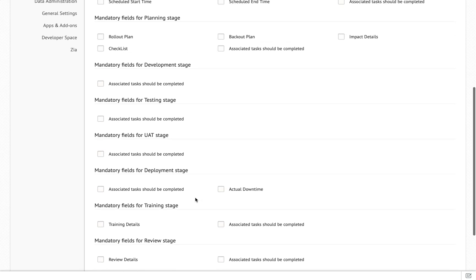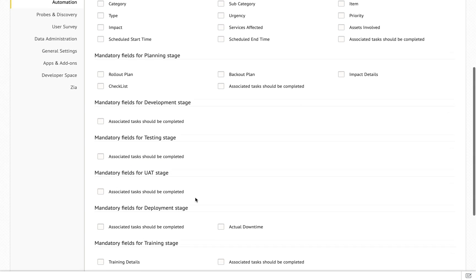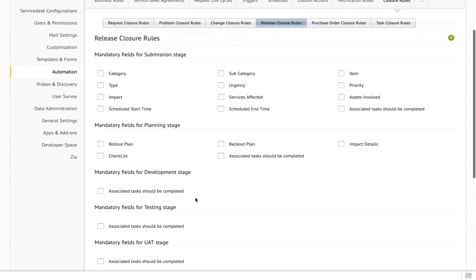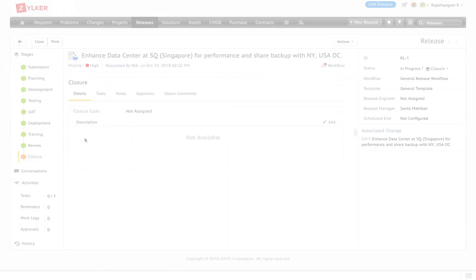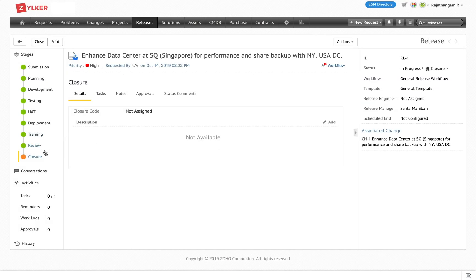For each of the stages you can have different mandatory fields to ensure accurate data is captured before proceeding to the next stage. Once the closure rules are satisfied, the release is successfully closed.